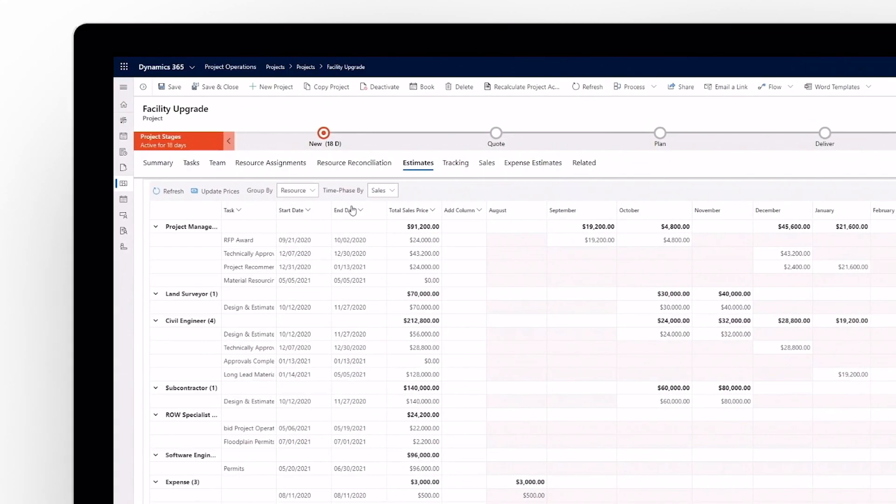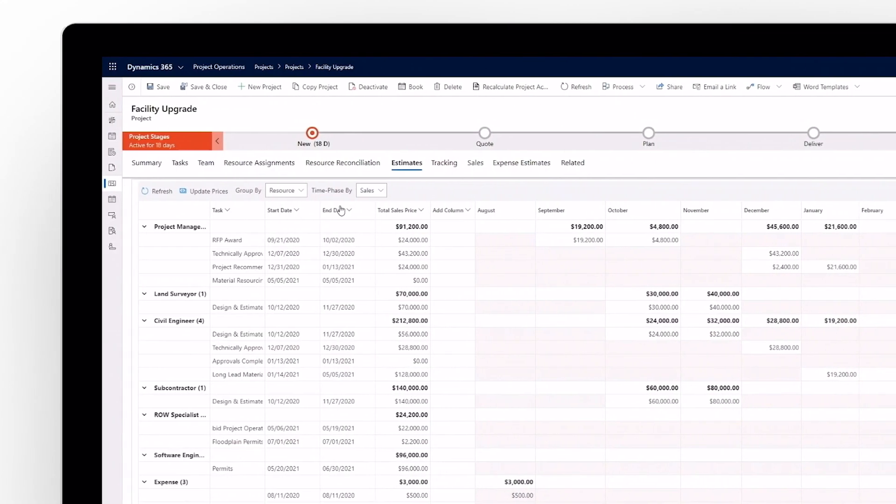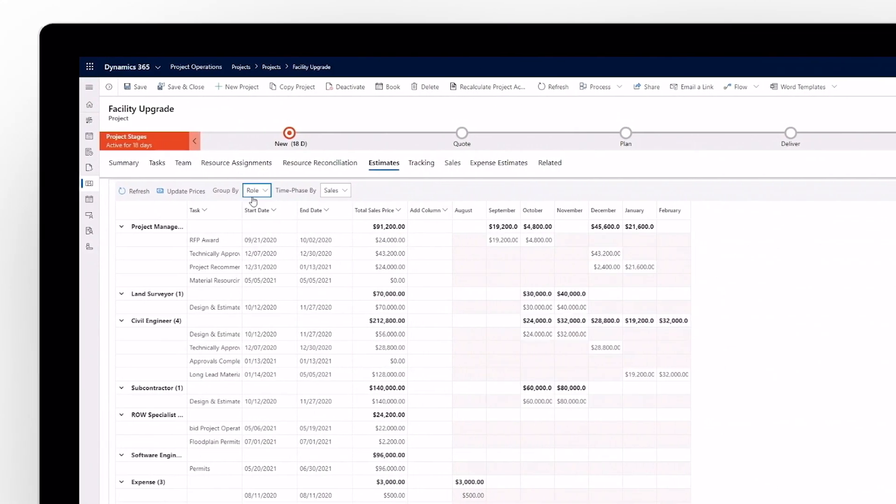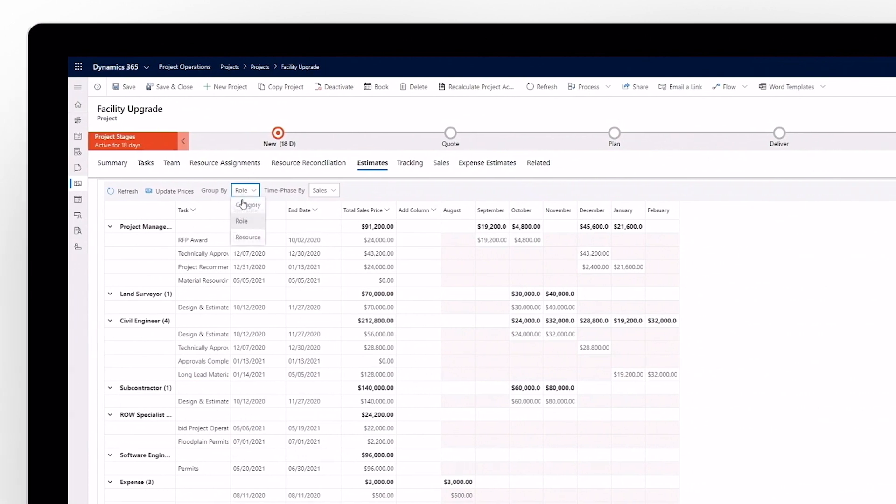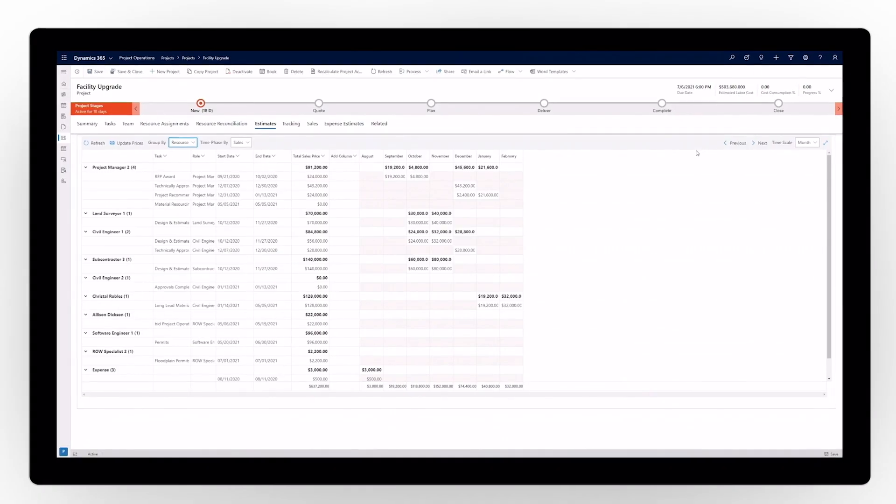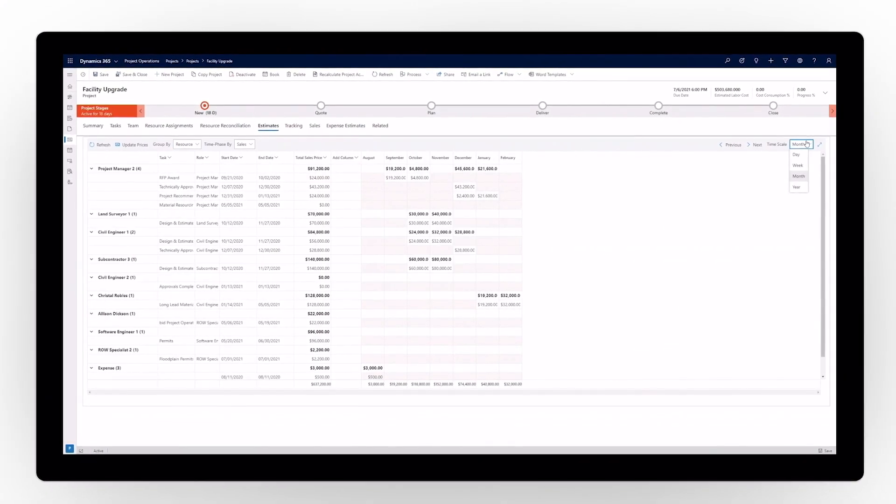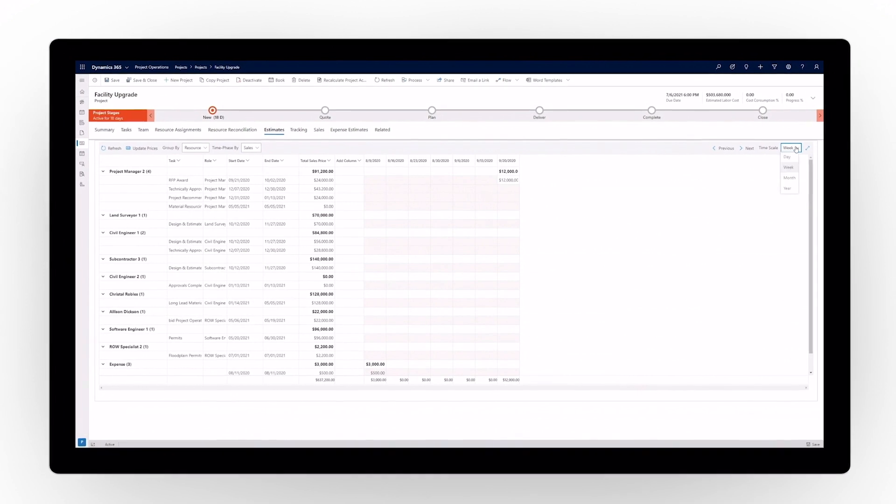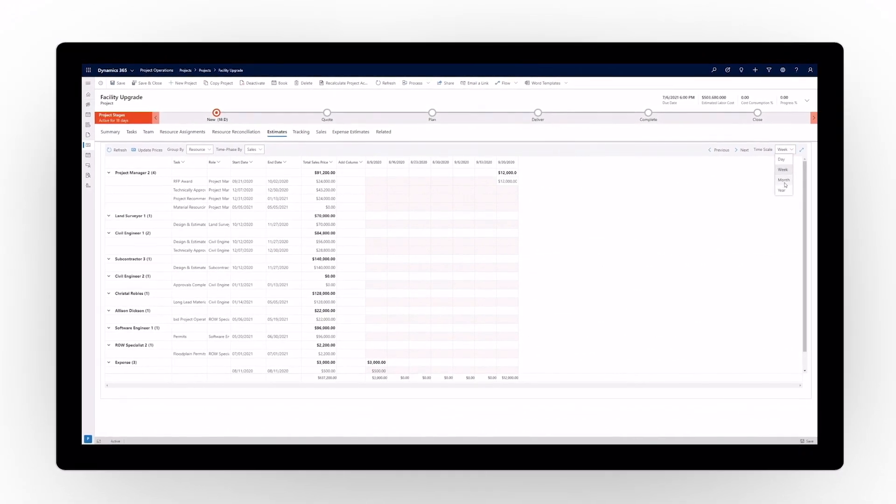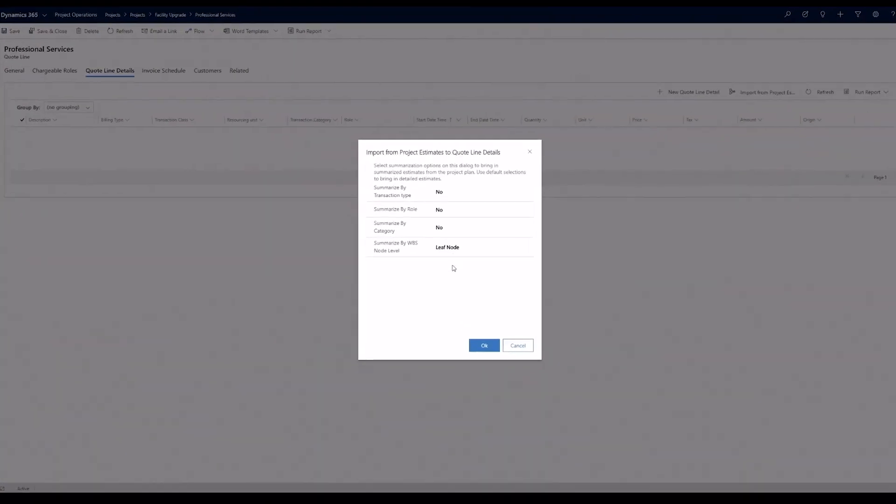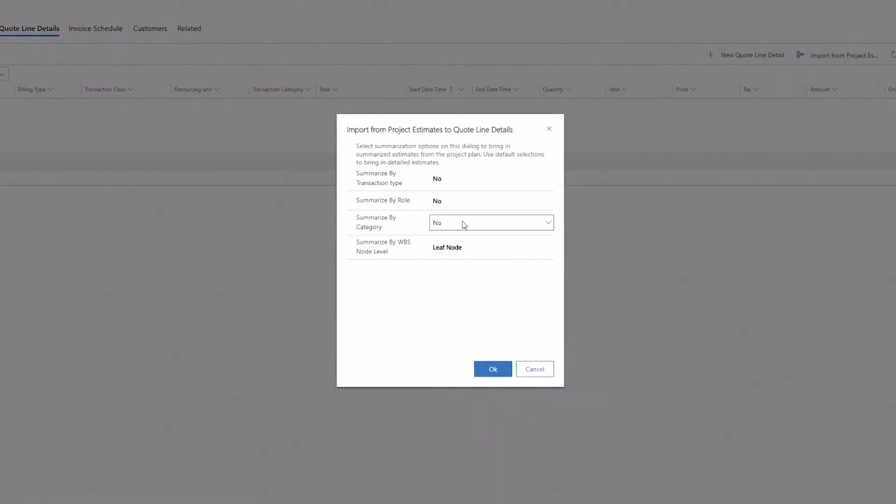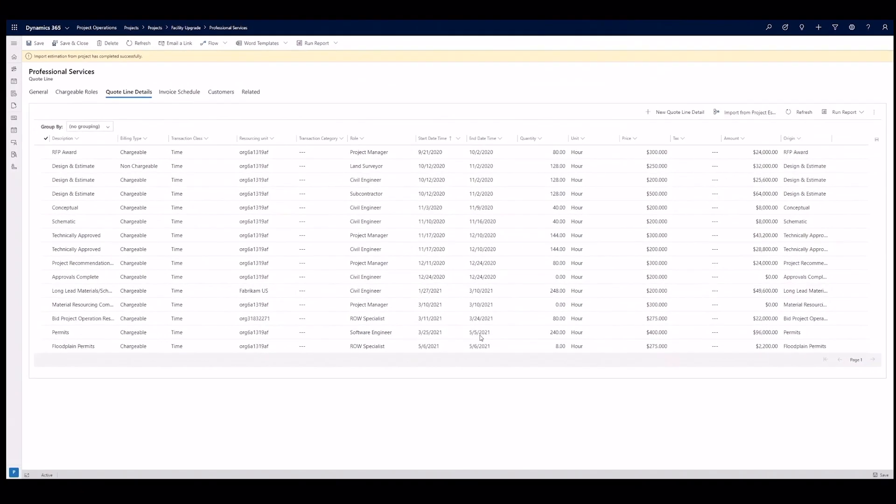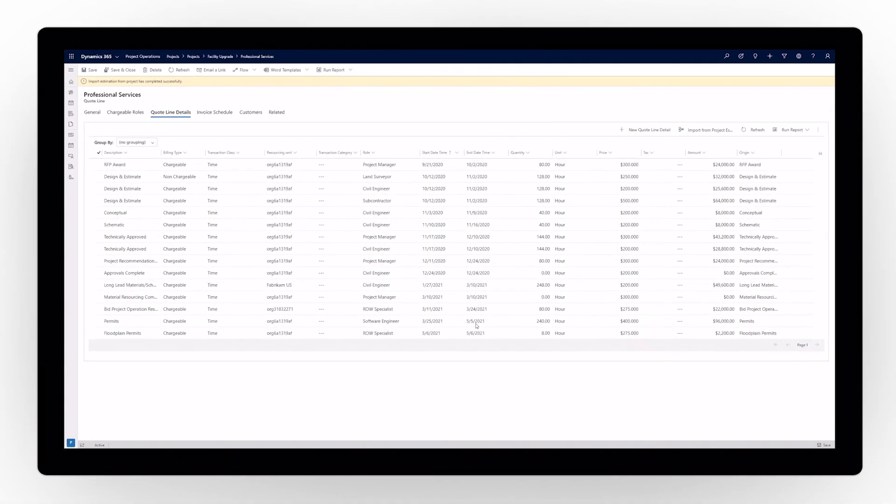Dynamics 365 Project Operations enables seamless collaboration between the sales and delivery teams to help refine customer quotes and accurately scope the work. Transfer project estimates directly to the relevant quote lines, saving time and avoiding errors or duplicate entries that may come from manual entry.